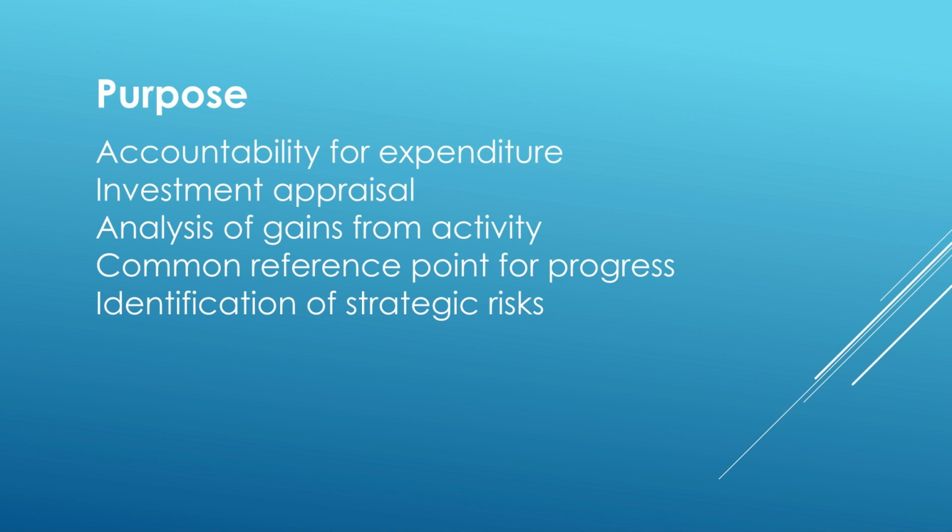The business case also serves as a common reference point for progress. So the business case summarizes what we want to do and why we want to do it, including what we're going to get out of it, those benefits. It means throughout the life of that project, and even beyond the life of that project, we can refer back to the business case to make sure that we are still on track to achieve those objectives.